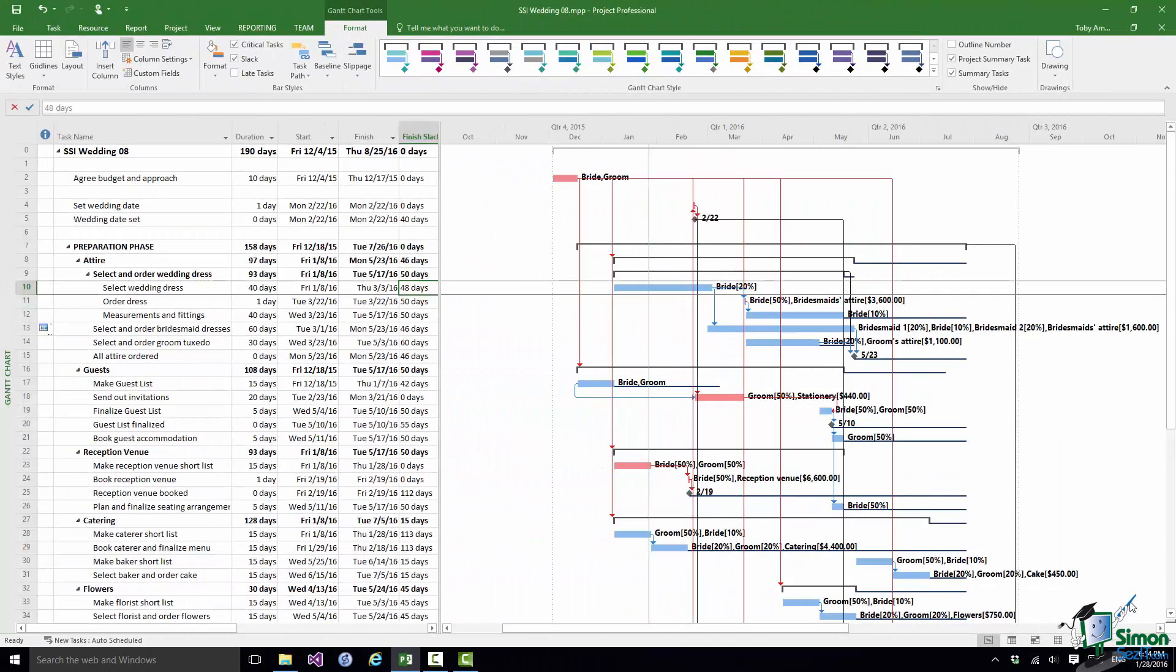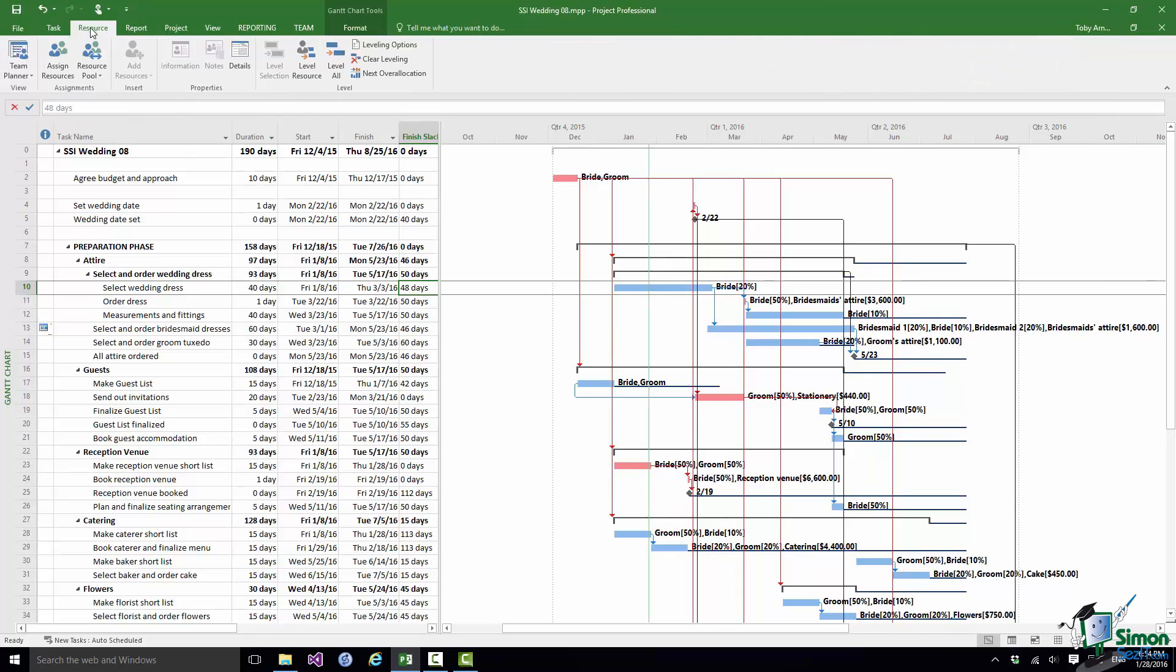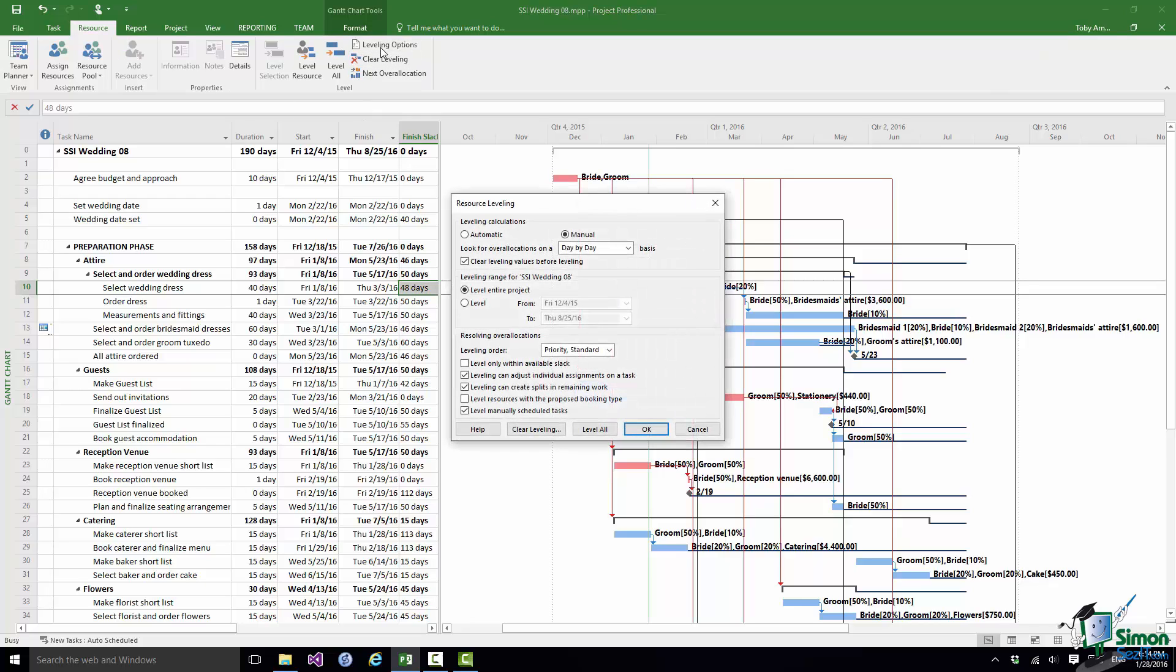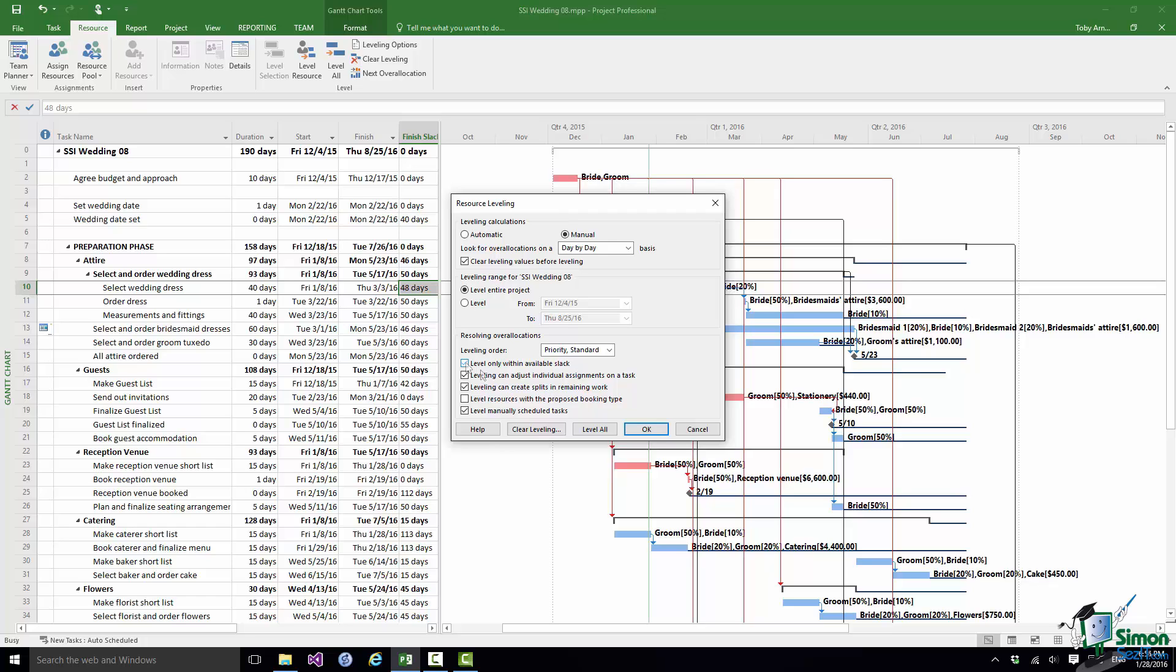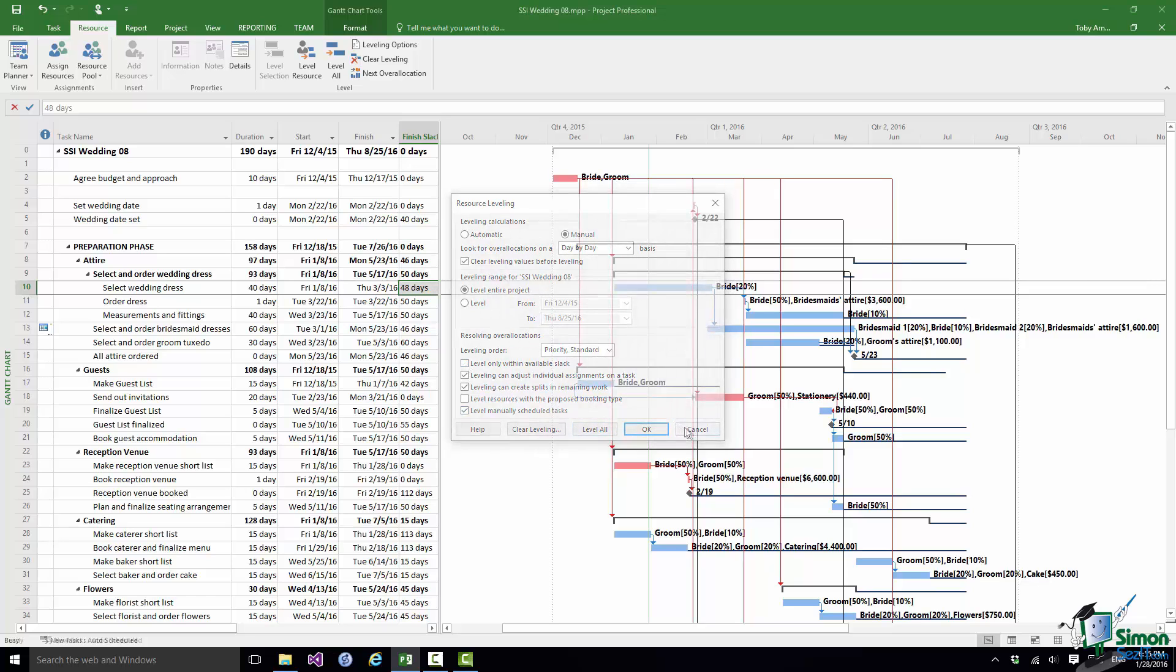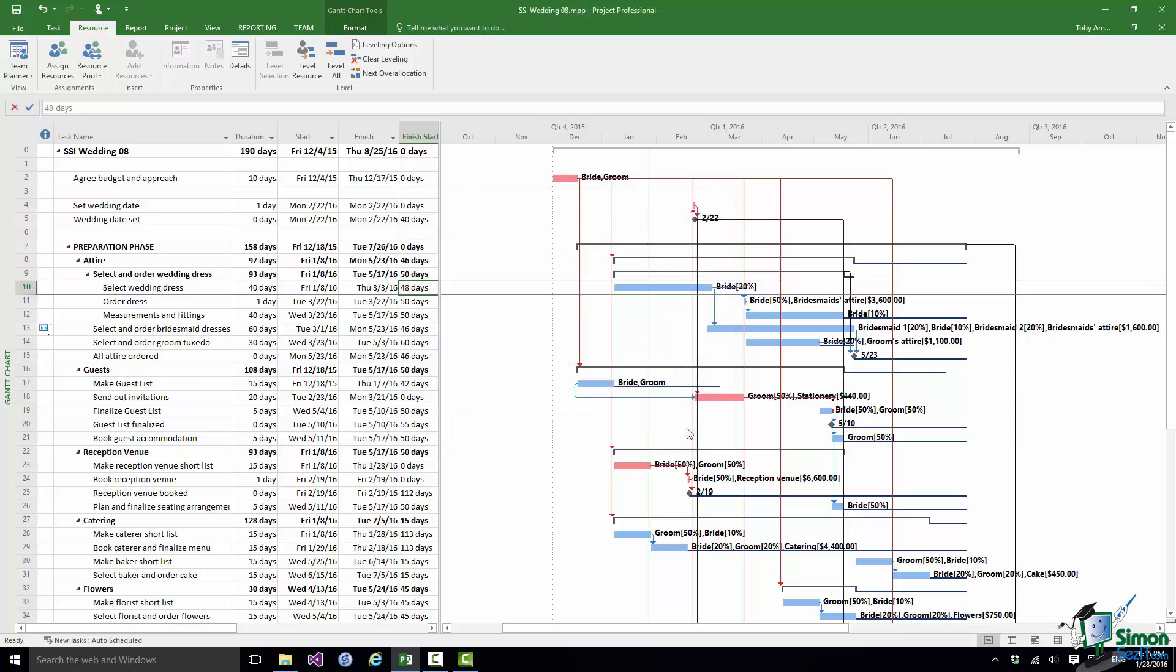So in this section we've looked at the Critical Path and Critical Tasks and at Slack. A couple of other things to mention. If I go back to the Resource tab and go into Leveling Options again, I mentioned this earlier on, Level Only Within Available Slack. If you click on Level Only Within Available Slack that does severely limit the amount of leveling that Project is able to do but it does also mean that you don't cause delay. And secondly, if you need to shorten the project, possibly to deal with a delay during the running of a project, the place to start is with the Critical Path because it's the critical tasks on the Critical Path that basically determine when the project is going to finish. So the Critical Tasks are the place to start.